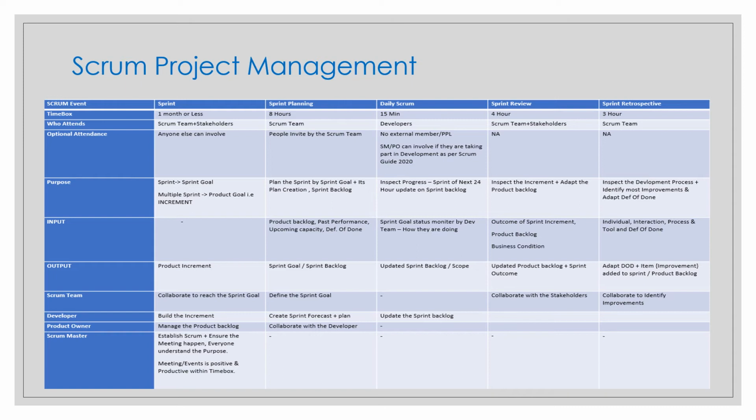The product owner owns this meeting, and he will invite the key stakeholders to the event, and the development team and the Scrum Master also take part. The Scrum Master's role is just to facilitate this meeting and to make sure it is held within the time box. It is at most 4 hours, and for a shorter sprint, it can be shorter.